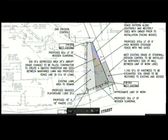In the original plan, we had graded longitudinally. We were matching the parking space grade, and then as we were going to the south, or to the right as you're looking on the plan, I was holding a flatter grade. But actually, we decided to leave the grades as is, which is about a 6-foot drop from front to back. So there's not going to be any substantial filling at all.